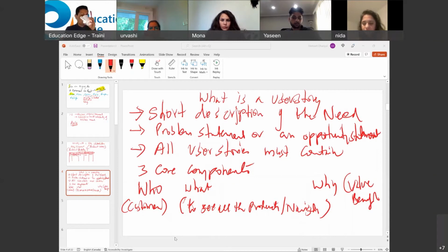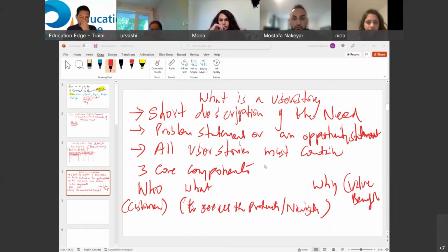A short description of the need. Okay, all right, what else? A problem statement or an opportunity statement. Okay, what else? A user statement, and then the who, the what. And all user stories must address three core components of who, what, and why. Who is the actor or the user of the feature? What, how they will use it? Why, what is the benefit? If a stakeholder cannot provide you the value or benefit that will come from a user story...